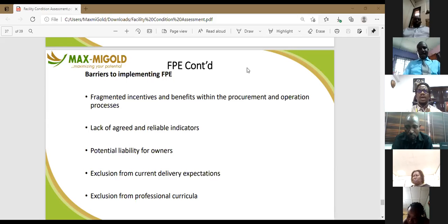And I'll now tell you, as you do this assessment, please note, we are not obliged to accept your position. We are free to have multiple assessors review our work. We are free to decide to act in the way we feel like, and so on and so forth. So you put those in the terms of engagement of those experts. So automatically you are in charge, all right?